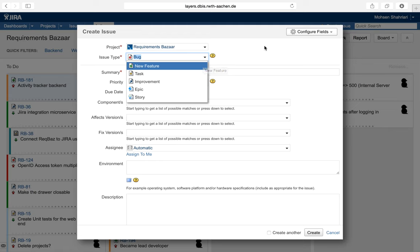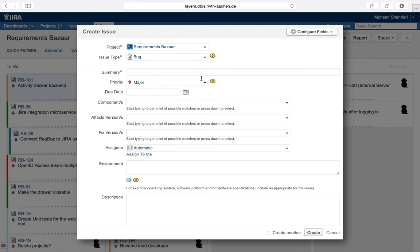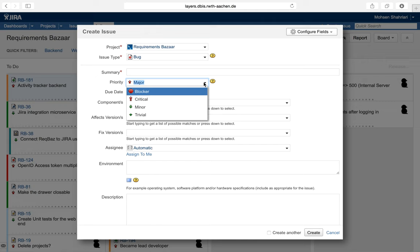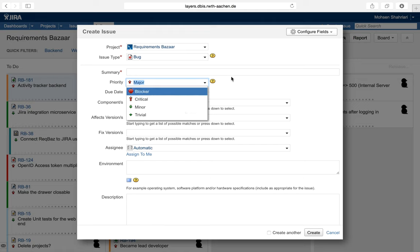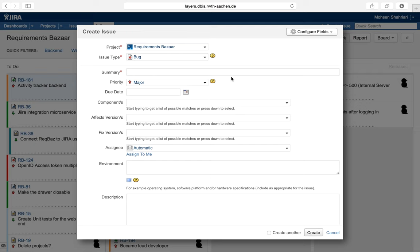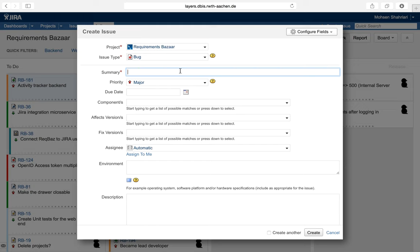Moreover, one can specify the priority of the task. For example, by clicking on priority tab and selecting critical, you can specify how urgent this task is. Furthermore, one can write a resource summary of this issue, assign the correct version of the software, specify the component relating to the issue and fill in the bar regarding the estimated time for resolving that issue.